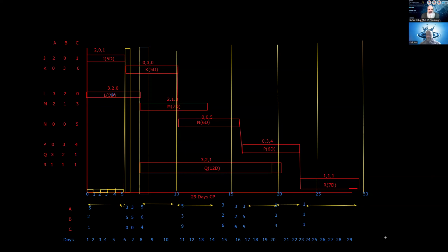You see, you could not have predicted how many people you will be requiring on any one of the days until you have the net schedule completed. Once the schedule has been completed and the resources have been loaded, only then can you exactly calculate all living and non-living resources. And then you can talk about balancing the resources.